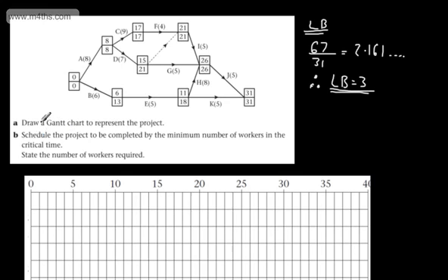Okay, let's go ahead and draw a Gantt chart or a cascade chart. If you haven't seen the video on that, please do watch that, as I'm going to assume a basic understanding. I'm first going to find the critical path or paths in this activity network. So we can see 0, 0, 8 and 8, and activity A is 8, therefore it's critical. It's got a float of 0. These 2 times are the same, and now it matches up.